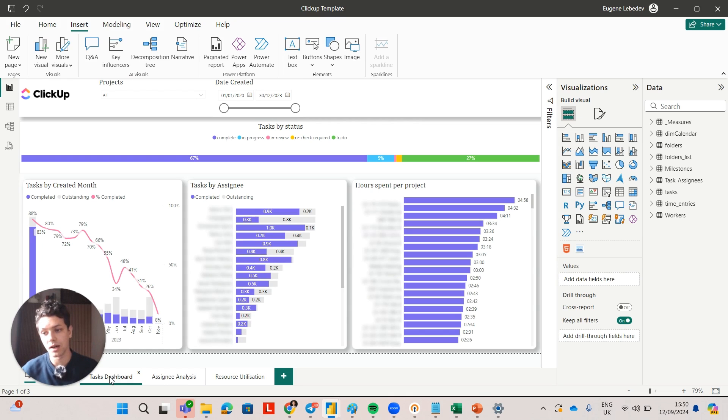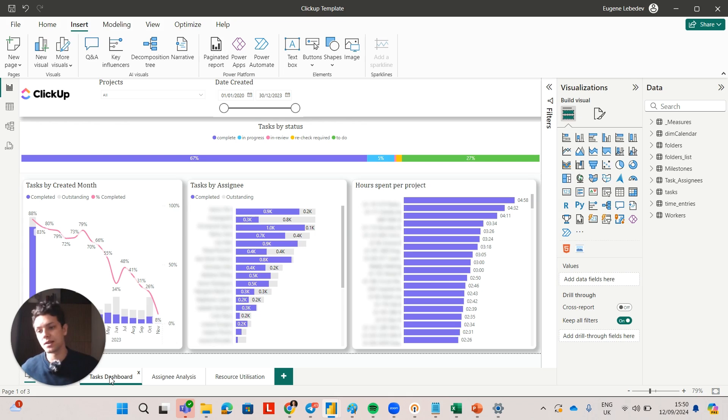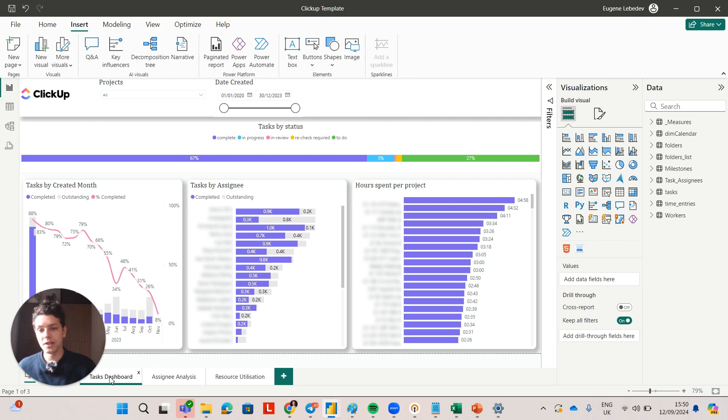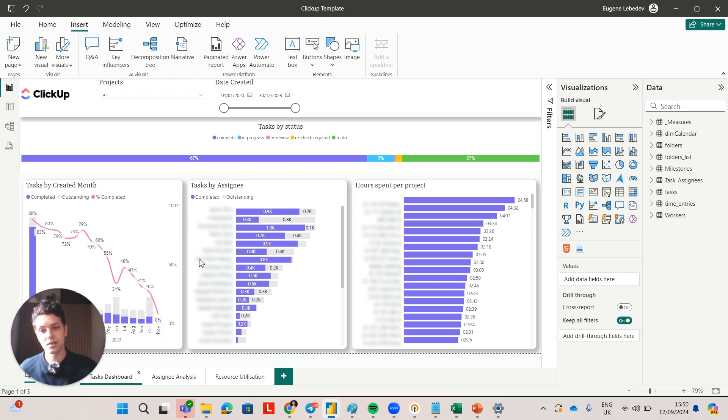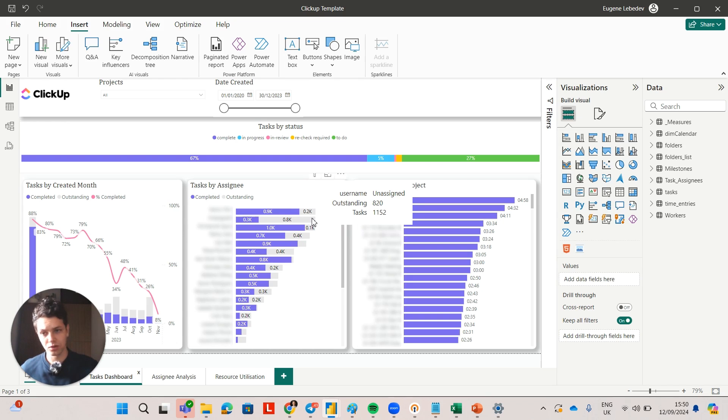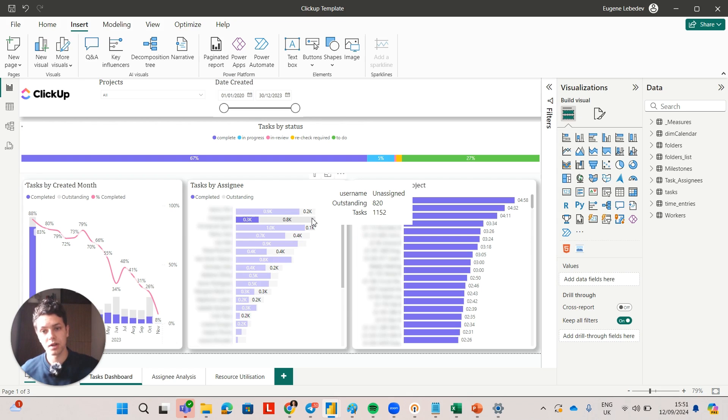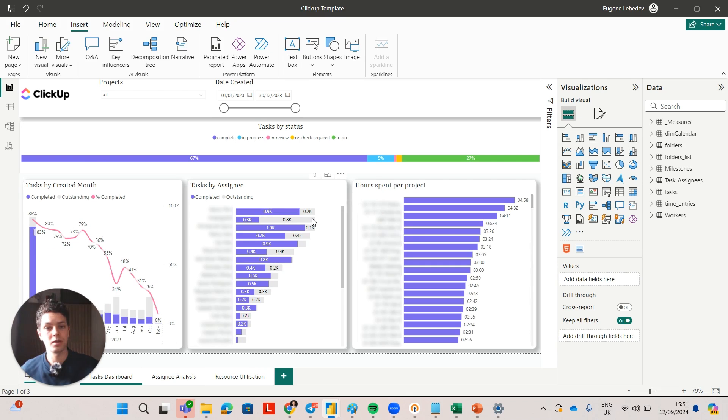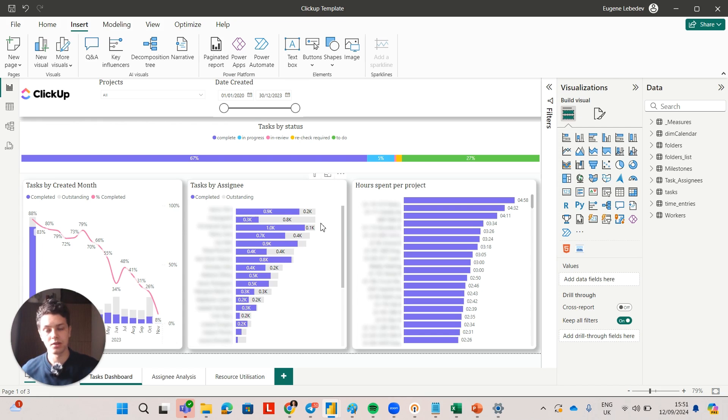Now the second dashboard I want to show is more of a project manager level dashboard. This is where you can see the actual hours by project and specific tasks that were completed. This is a standard template for ClickUp which we install for all of our clients who need Power BI dashboards with ClickUp. Essentially it shows completed and outstanding tasks by assignee. For example, the second bar here is for unassigned, and obviously most of the tasks here are not completed. So the immediate action that you can take is you can click here, you can see which specific projects and tasks are in the unassigned bucket and you can assign those tasks.